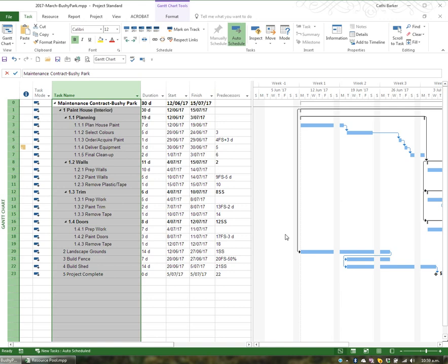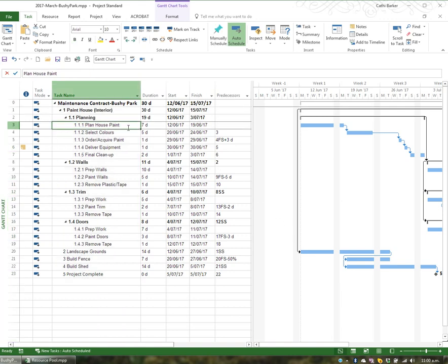So to avoid your task duration suddenly increasing and decreasing erratically without your control, I would recommend that you fix the task durations. Do your initial assigning of resources and then later you can unfix them by setting it back to fixed units, and you can see what adding more resources and removing resources will do to the task durations. So it's just highly recommended. So now we're in a position to start assigning people to tasks.